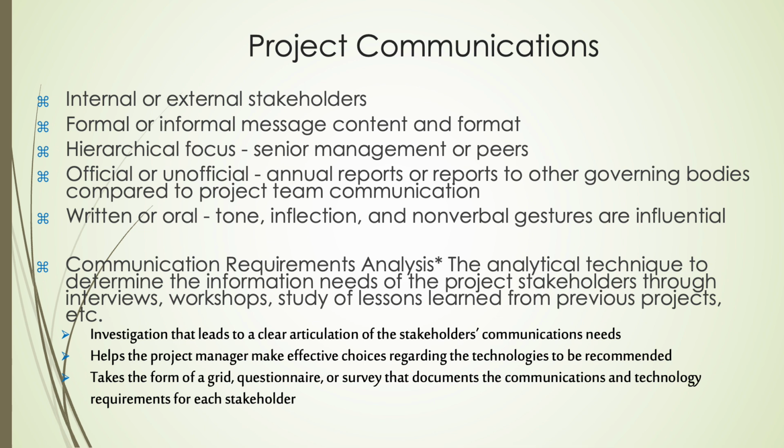Communication requirements analysis involves identifying the specific needs for communication within the project. This analysis includes determining who needs what information, when they need it, and how it should be delivered. Key factors include the number of stakeholders, the complexity of the project, and the information needs and distribution methods. By thoroughly analyzing these aspects, project managers can develop effective communication strategies that ensure clarity, minimize misunderstandings, and contribute to overall project success.